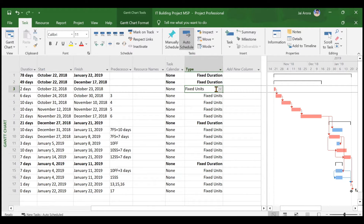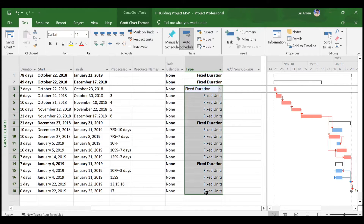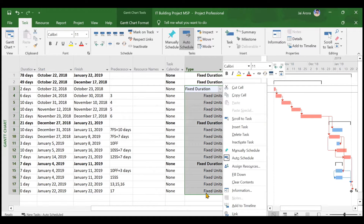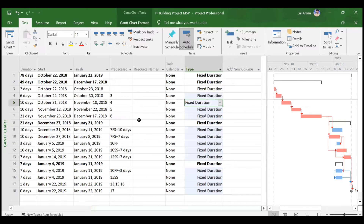You can see fixed duration and fixed units are already there, but we need to make everything fixed duration. Either you can change them one by one, or use the fill down option: click the first one, hold Shift and select the last one, then right-click and choose 'Fill Down.' This changes all activity types to fixed duration. This fill down method also works for calendar, predecessors, and other columns.